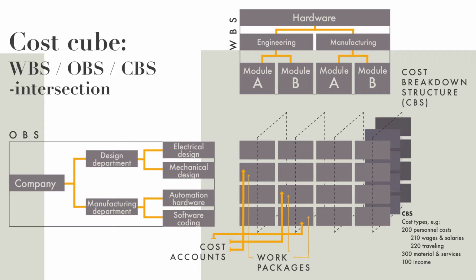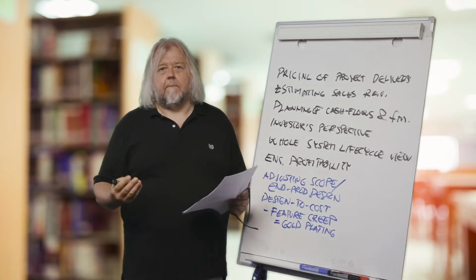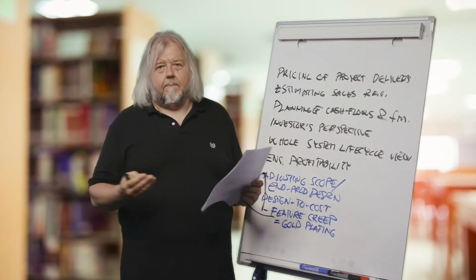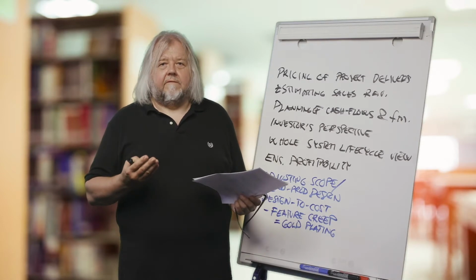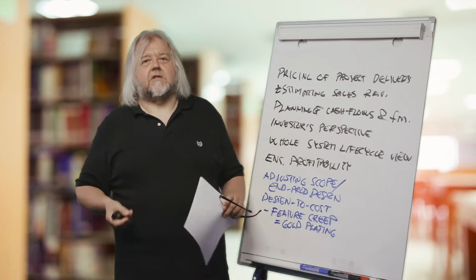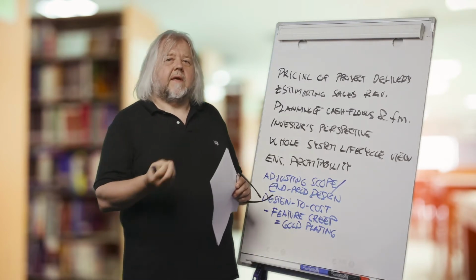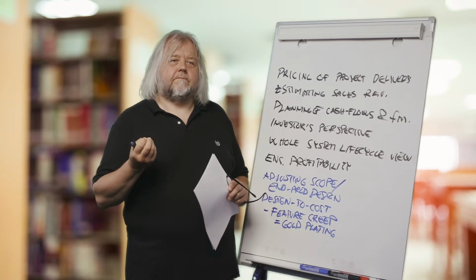So this is also a company level structure. And the only structure here which is project-specific is WBS, work breakdown structure. And it's then connected to the company's other systems and accounting, and we can detail, for example, our cost estimates and budgets and actual costs by recording them into these structures.